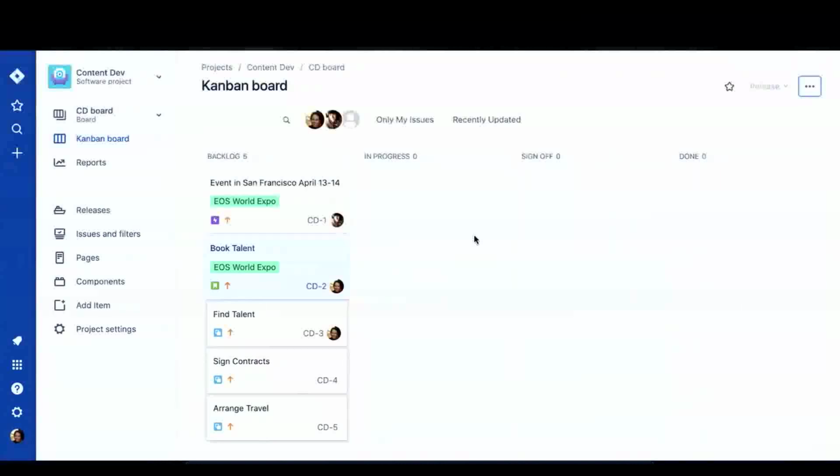And basically what you do at the beginning of that 2 weeks is you look through your backlog and you say, I can do this one and this one in 2 weeks. And you commit to a certain amount of work for 2 weeks. You don't have to get it done. And if you get it done early, you can bring in more work. But the whole goal of a sprint is figuring out how much work you can get done and planning effectively.